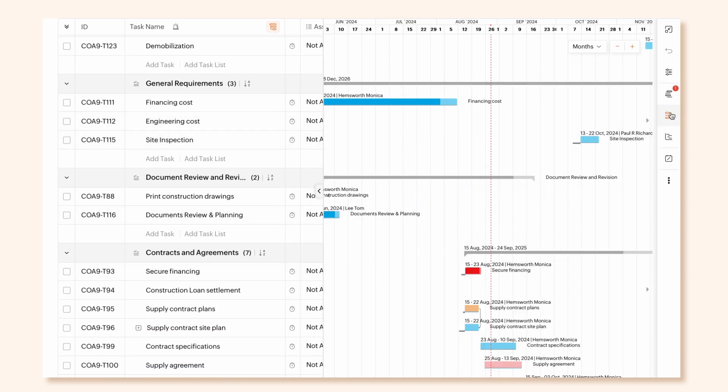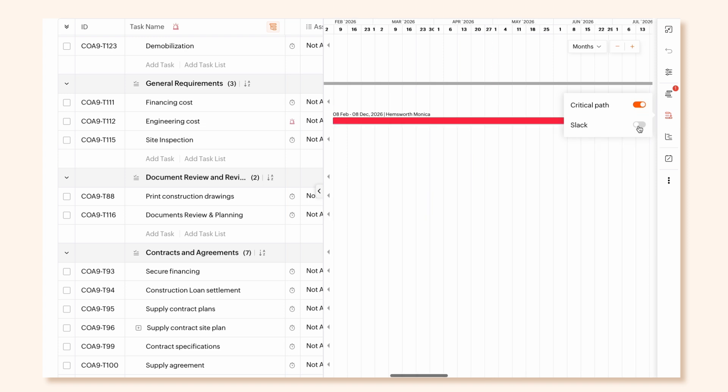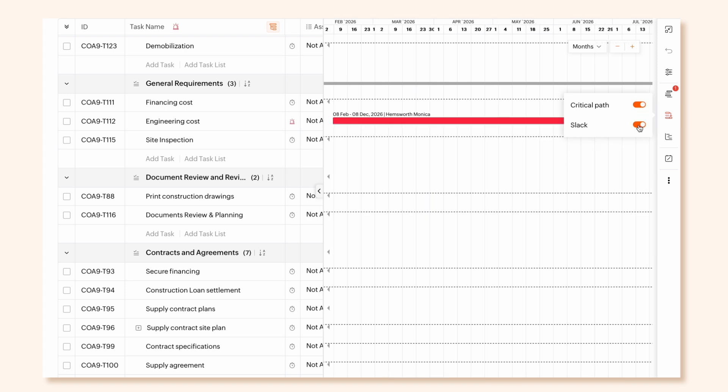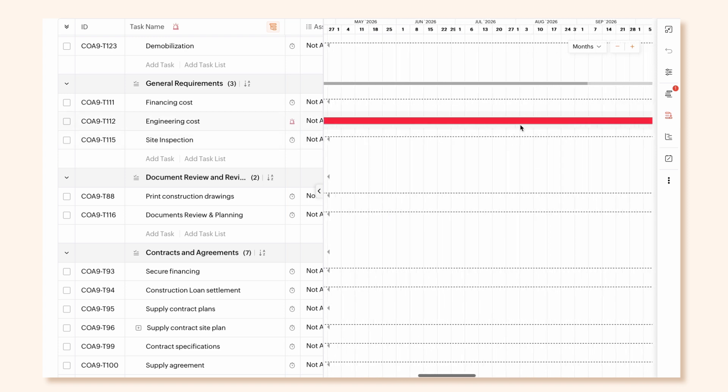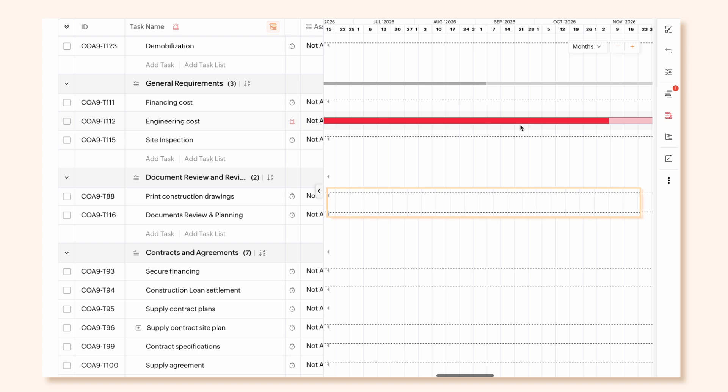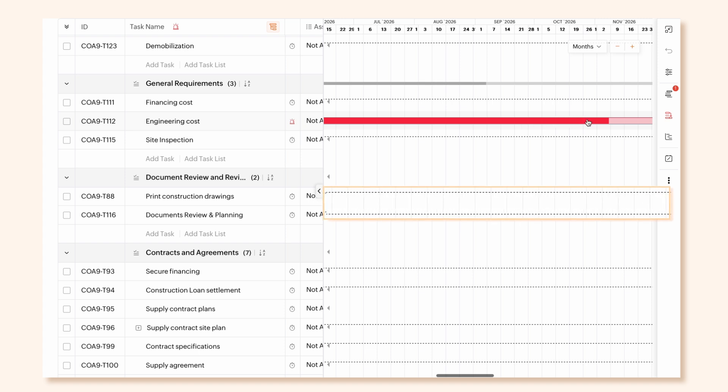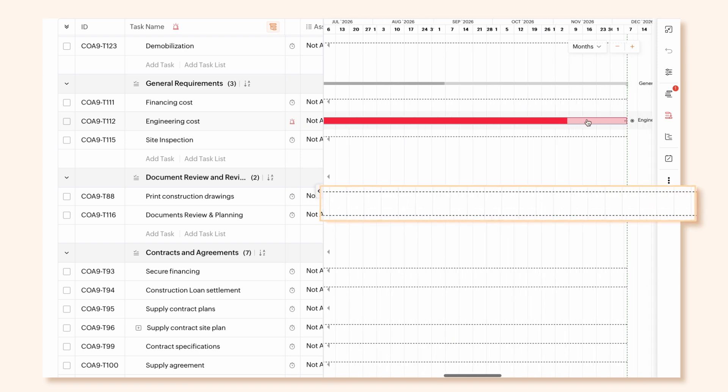Critical Path helps identify critical tasks that can impact your project's timeline. Slack shows you the acceptable delay in a project shown with dotted lines.